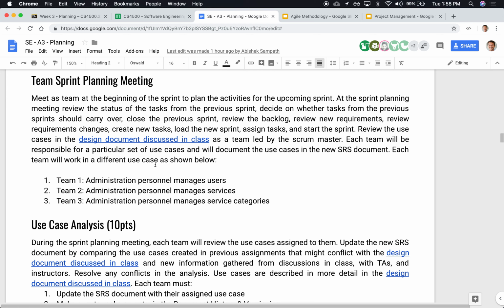Yes? So the Scrum Master will be responsible for keeping the conversation going. If the Scrum Master sees folks going into details, they're going to say, take that offline, deal with that later. We just keep going with the status. Oftentimes, these status meetings are referred to as stand-up meetings, where you come for 15 minutes, nobody sits down, nobody gets comfortable, so that we get in and get out as quickly as possible. Everybody hates meetings, so we don't want them to keep going on and on. Just real quick, in and out, okay?